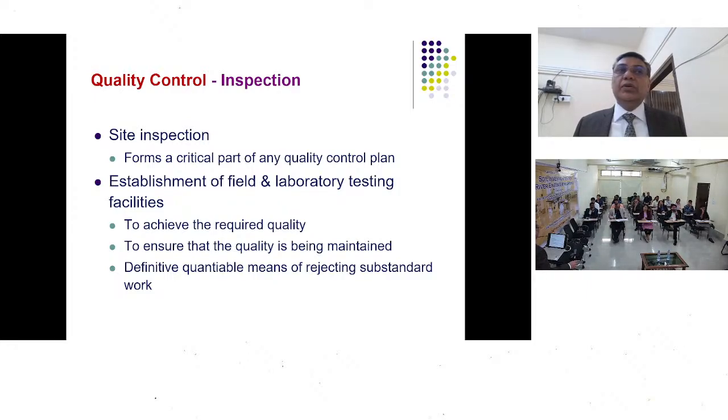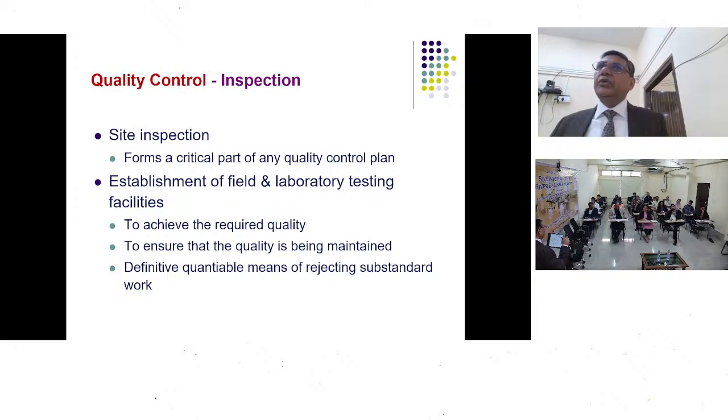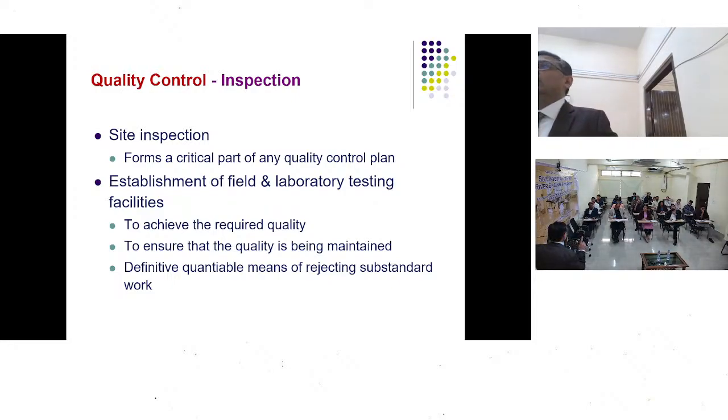The project people say that they have established a quality control laboratory in which you can do a grain size distribution using the pipette method, and maybe they have only two cylinders and one pipette, and during the process of testing that pipette gets broken. Now the whole quality control program comes to a halt.